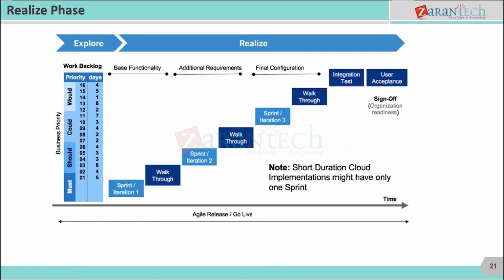It's a one day session with the business, a workshop where I'll be able to showcase whatever I've developed in the last 1.5 months. It might be just 30% of the things, but here we give the client a chance of visualization. In the initial days itself, they are collaboratively working with the project team. It's not that they give the requirement and after 4 months they ask you for the output.